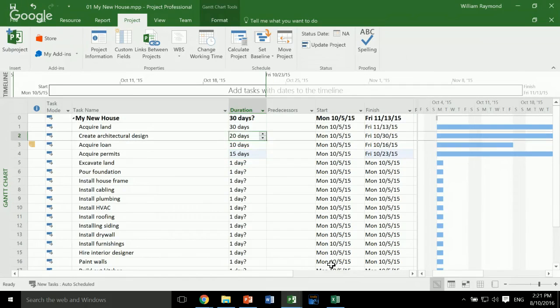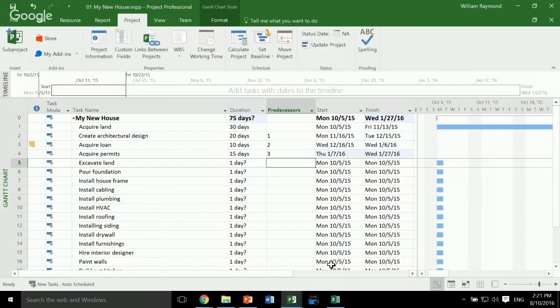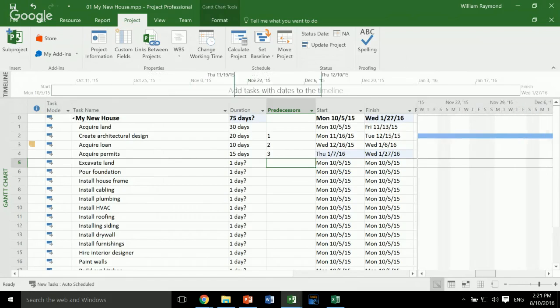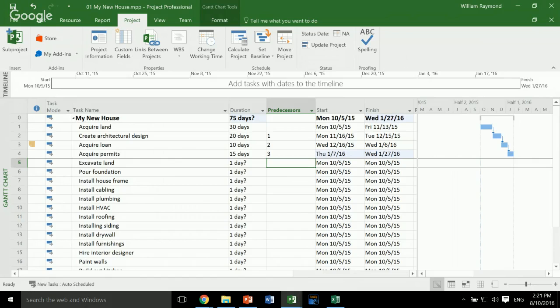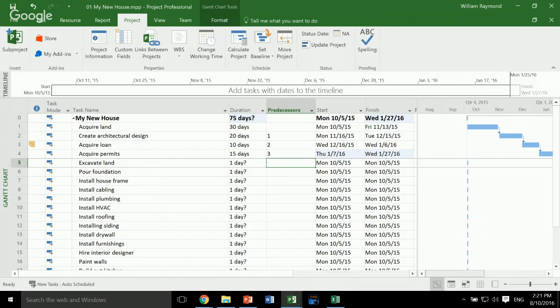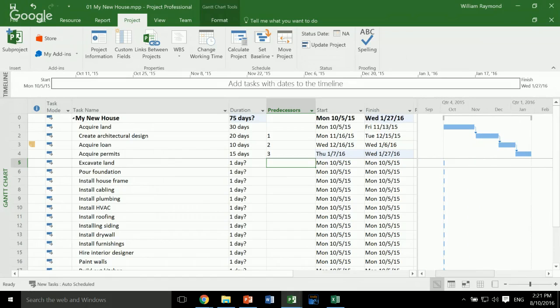And then I'm going to go ahead and link my tasks, just as I showed you before. And as I do this, you can see that the Gantt chart is expanding. You might be wondering, well, there's a lot of scrolling. Can I fix that? Yep, down here at the bottom there's a zoom tool. So I can zoom in and zoom out and see where my Gantt chart is right now. You can see there's a little timeline here at the top.